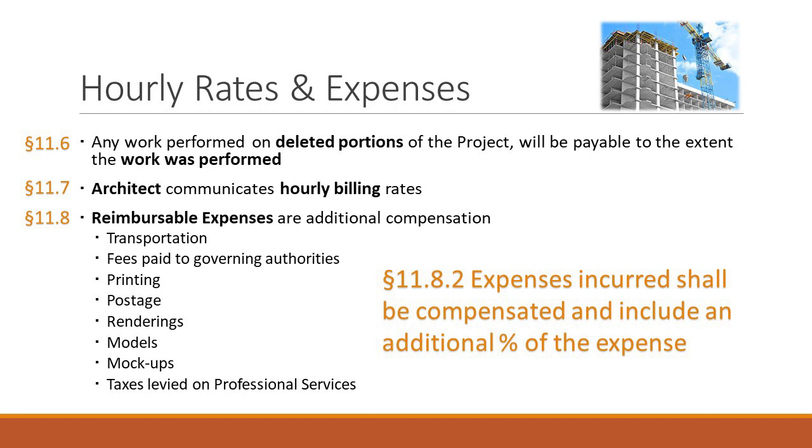So if you designed the $1.1 million house, you may have to redesign portions of it for free, but you still get paid for the work you've done to date. The owner can't say, I'm not paying you for the additional $100,000 worth of services. You have to be paid at least to date. And when the bids come in, you're going to have to sit down with the owner and figure that out. This provision rarely comes up, where the budget is blown and you're being asked to redesign for free even though you're paid for the work you've done to date. But it sometimes comes up, so they wanted to spell it out in the provisions to tell you how it works.